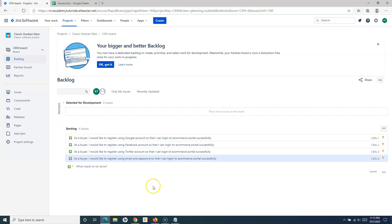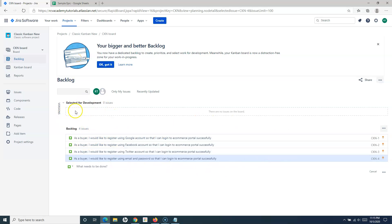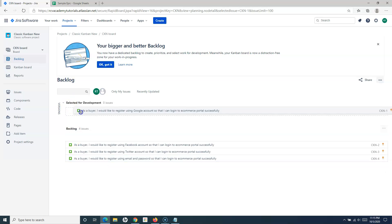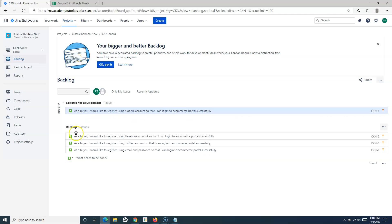This backlog is basically now ready. This is just a sample backlog. In actual scenarios and projects, there will be lots and lots of issues and work items in the Kanban backlog. Once your backlog is ready, you can pick the items for development and just drag and drop them into the selected for development column to start working on those items. Once you select the work item, it goes into the selected for development. This is how you create the backlog in the classic Kanban project.